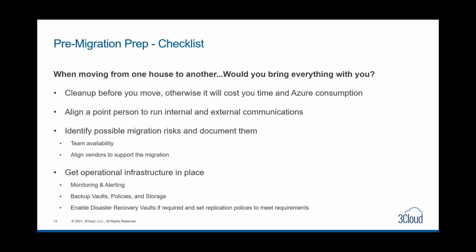Aligning vendors to support the migration if needed, right? So if you've got third-party COTS apps that may require some additional support, let's get them lined up ahead of time. That's a risk that we can mitigate by having it on our register and making sure that we're preparing for what those scenarios might look like.